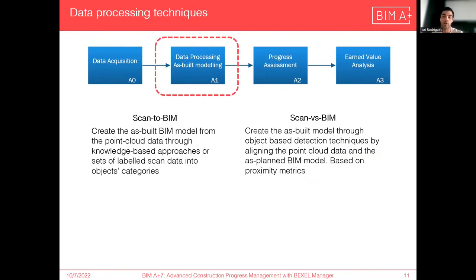Next, we have the data processing, in which we found two main methods: scan-to-BIM and scan-versus-BIM. In the first one, the as-built BIM model is generated in an automated way from the point cloud data using knowledge-based approaches and machine learning algorithms. The second one relies on the matching of the point cloud data to the as-planned BIM model using proximity metrics to detect elements present on the construction scene.